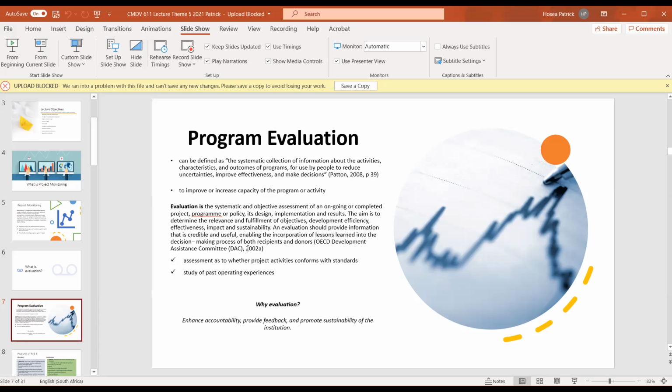The contribution you made. So it's a continuous process of checking, observing, and ensuring that a project's milestones and deliverables are met, ensuring that projects are still on track. That is what monitoring is. While evaluation is a once-off process, right? It happens either in the middle of a project or at the end of a project, and that's what it is. And then we'll talk about evaluation being external and monitoring being internal.